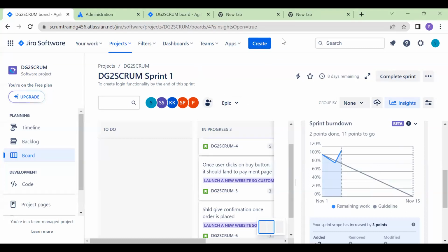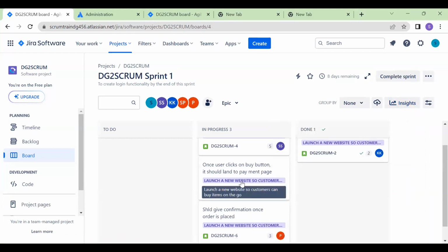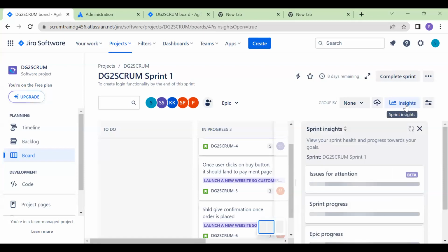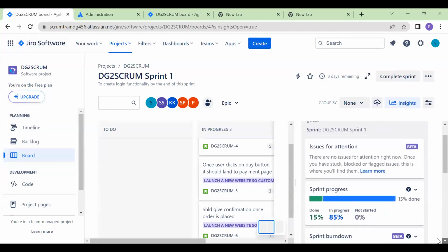These points are deleted. What is the reason? Because it is computed daily. These are 2 points. Yes, yesterday we moved that to done, right? So because of which it has come down. It has come down, but why are the points removed? See, the burndown chart has to take only which are there, not which are not there. So from 10 it got to 8 only. Today I have added 3, so again it went up.